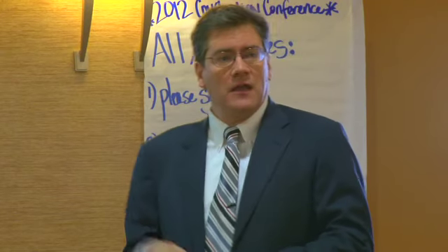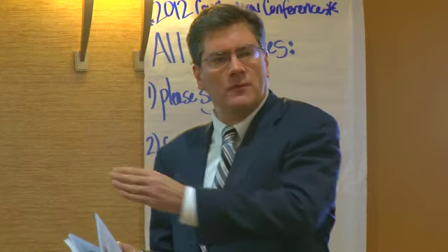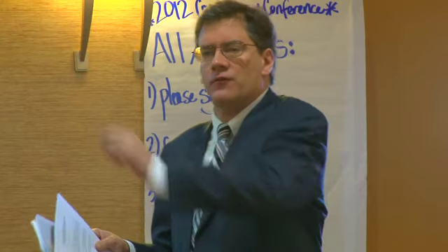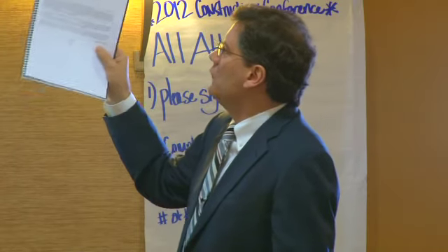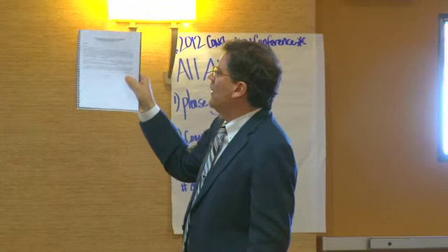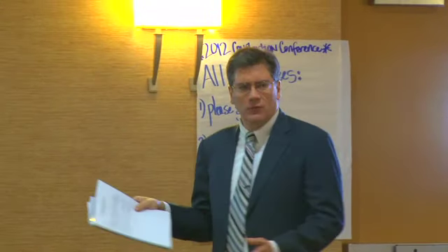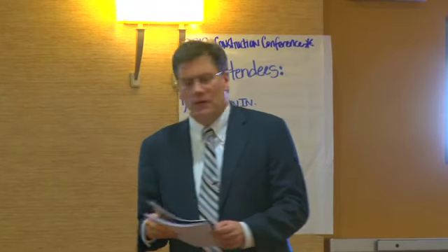So what you've got to be careful of is you retain your rights to deal with your subcontractor, potentially file suit for the other $20,000. But this language, as written, says you're going to waive any claim for payment under any similar rights related to the job of whatever. And your statement of account just identifies Phoenix Children's Hospital.